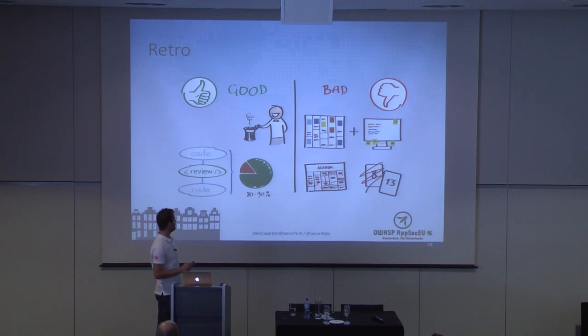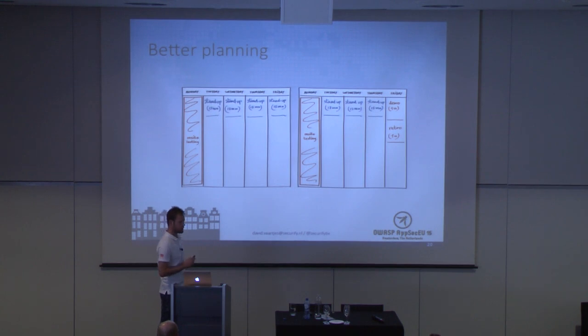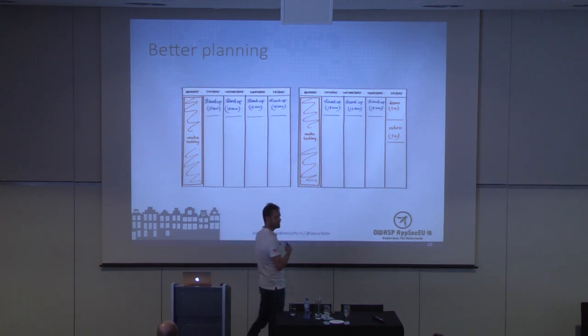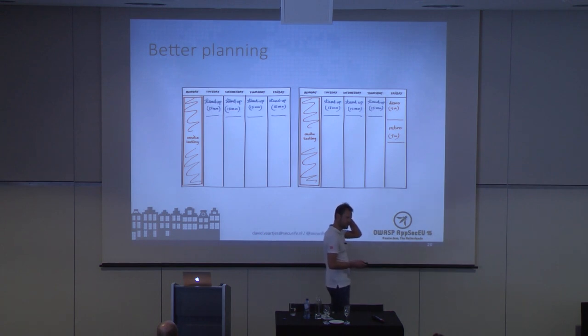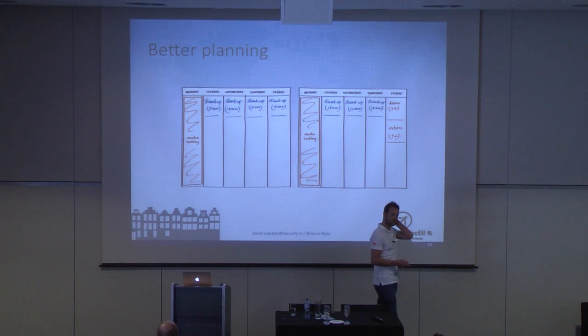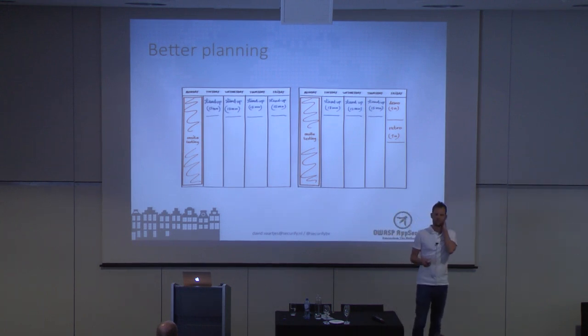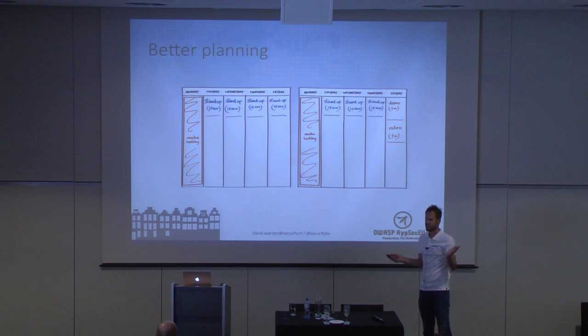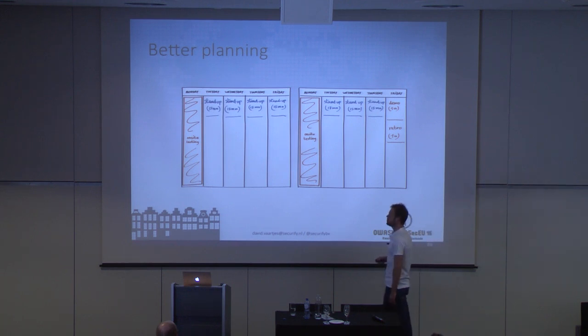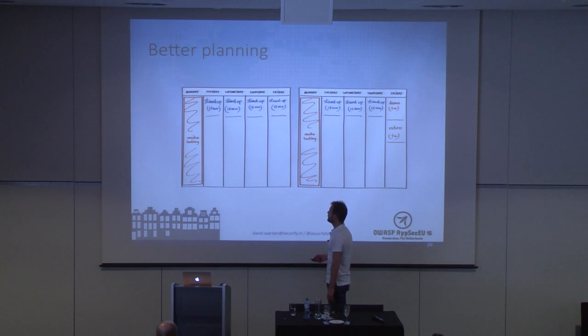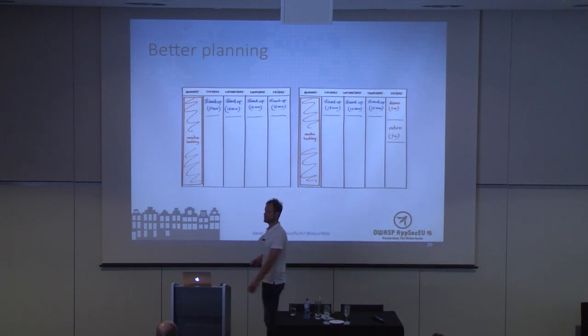So to solve this planning issue, we decided to just get on site for one day. Generally the day of the grooming, so we could join the grooming session. And for the rest of the day, we just sat together with the team and reviewed the user stories, chatting about security, sharing some knowledge here and there. And this was way more efficient because we just collected all the stories that were checked in the week before, and we did a review on it on Monday. And if we got some feedback, we were sitting together, so we could fix things really fast.